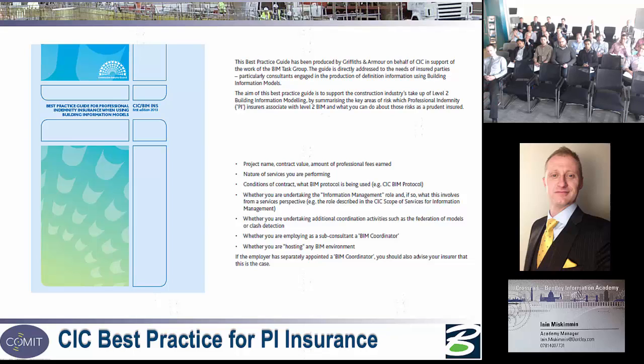Hang on a minute, suddenly I am liable because it's my information, it's my 3D model that they're using now to operate and maintain that. So if there's any mistakes in there, where did it come from? Well, it came from him. Oh yeah, part of the contractual deliverables were that 3D model, right? Okay, it's his responsibility. So I now need to have insurance against that.